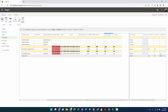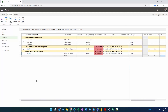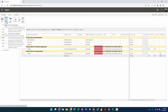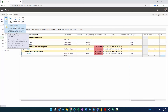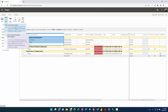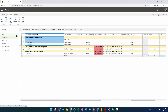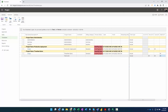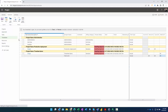We did 16 of 16 - 100% complete. The copied project shows 8 hours actual work, 50% complete. Now I want to submit these actuals to the project manager for approval. I'll click Send, then 'Send Progress' - this sends just the project-related tasks. If I wanted to submit the entire timesheet including operational activities, I'd select 'Turn In Final Timesheet,' which I'd typically do at end of week. After submitting, the status changes to 'Awaiting Approval.'